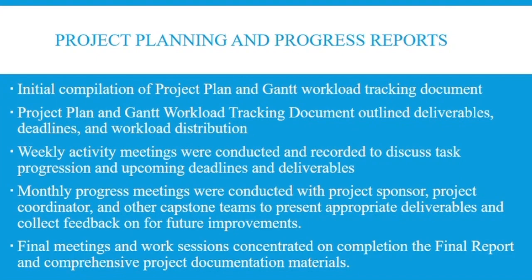We geared our internal project deadlines to our monthly progress meetings, in which we focused on making sure we had certain deliverables by the time of these meetings, so that we could show them to our client and make sure that we were on the right track and properly fulfilling every requirement that they desired for the application.